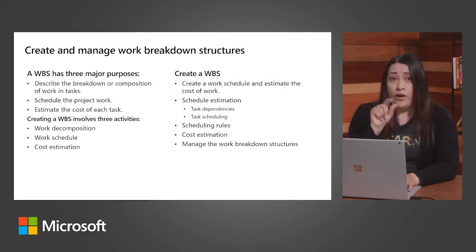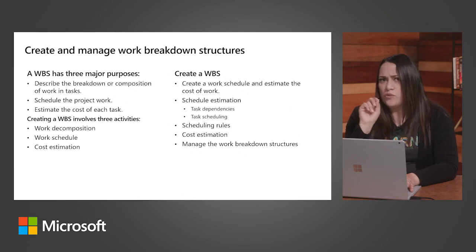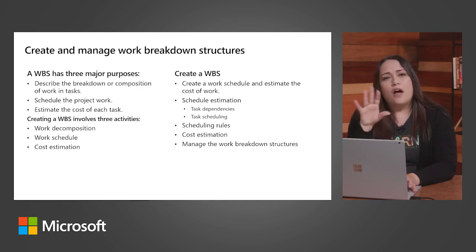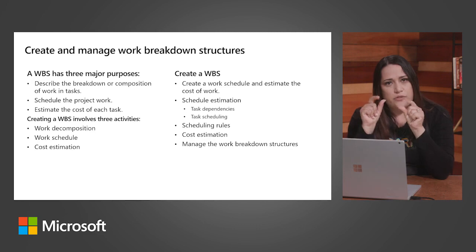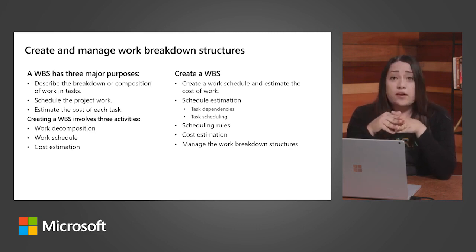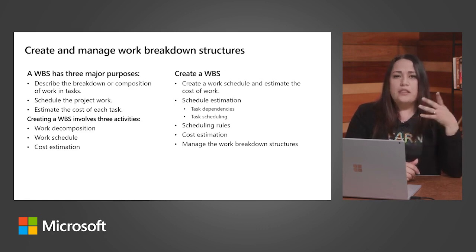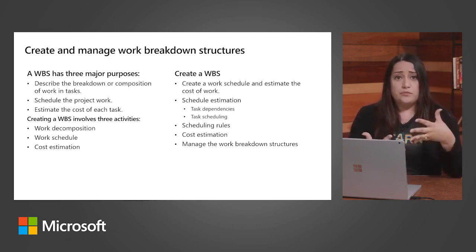Now, for this next session in Module 6, I do want to explore the tools that can specifically assist with the execution phase of the project. And when you get to that phase, oftentimes project managers are going to break down that project into mini milestones. We have a tool inside of Dynamics called the Work Breakdown Structure, or WBS. This is a tool that integrates the scope, the cost, and the schedule baselines, and it basically ensures that the project plans are all in alignment.